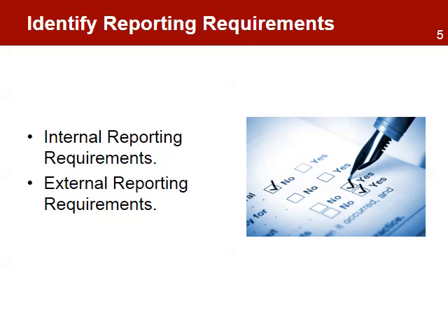There are many potential uses for the performance report. The project manager should develop a plan that identifies what type of reports need to be produced, how frequently, who should produce them, and who are the recipients. These requirements can be categorized into two groups: internal requirements and external requirements.